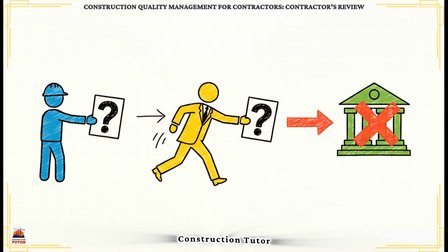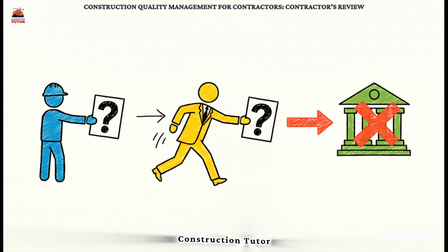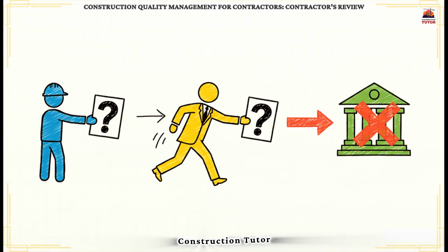As the prime contractor, it's your job to manage your subs and to own the communication with the government. Just forwarding a question is not only unprofessional, it's lazy and inefficient. You have to review it, coordinate it, and formally ask the question yourself. You can't just pass the buck.